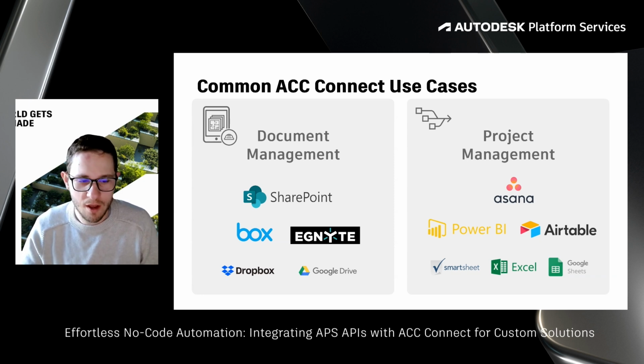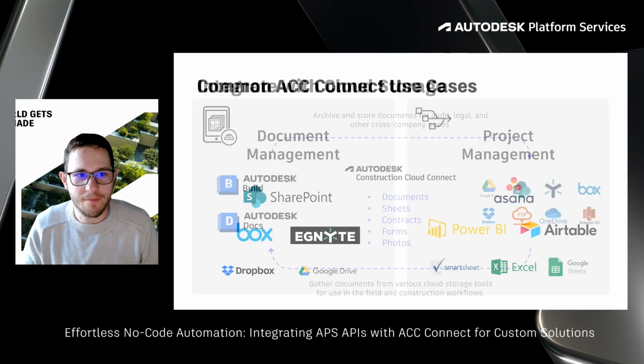Really common workflow, especially with Smartsheet, is to extract out all the data from the issues and then organize them in your own way inside Smartsheet. So have rows and columns and whatnot, everything that comes from Autodesk Construction Cloud. It's bidirectional. So if you were to update something in Smartsheet, for example, that can reflect back over into Autodesk Construction Cloud, say the status of an issue, or who it's assigned to, or the description, or so forth of it.